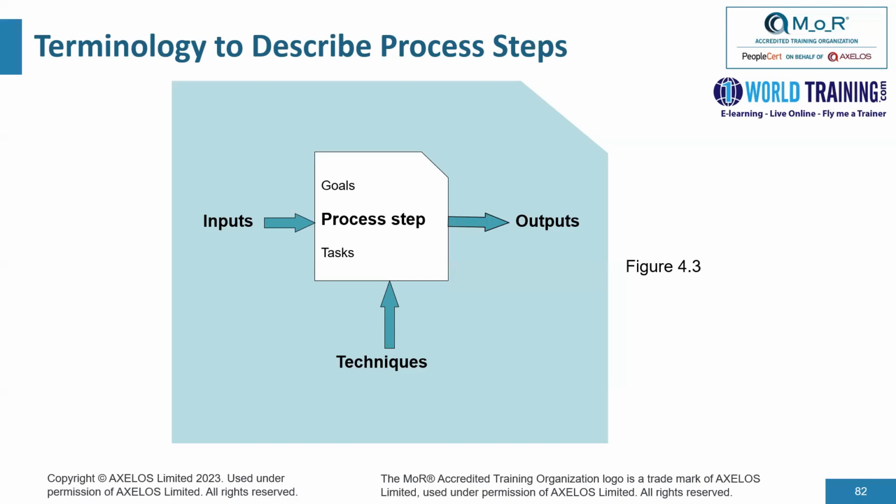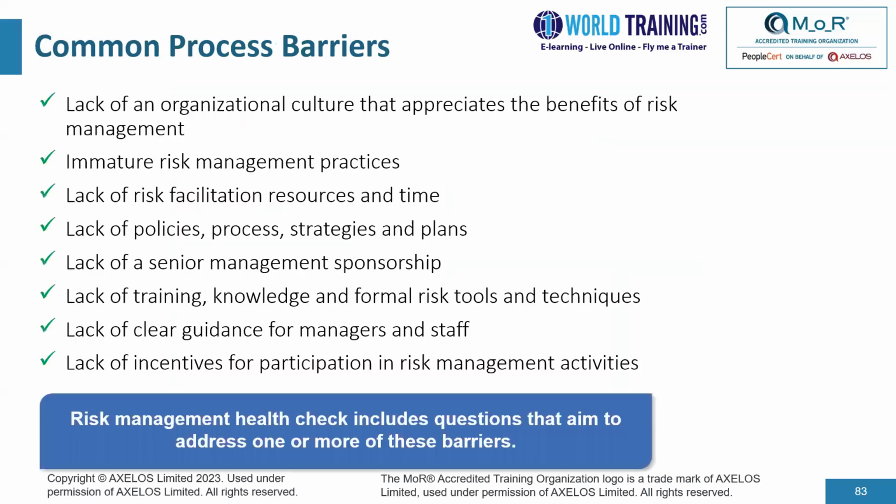Now, let's look into some of the common barriers to risk management. A lack of an organizational culture that appreciates the benefits of risk management is a common barrier. Oftentimes, in certain cultures, if you articulate a risk, you're penalized. That hinders the process of collecting risk.